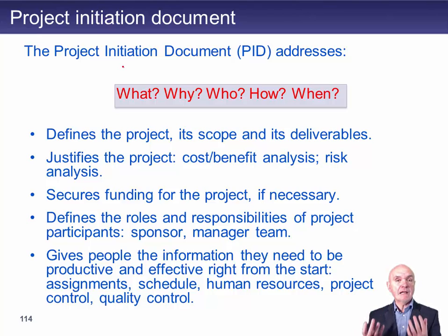So all these big kind of questions, how much is it going to cost and so on, are going to be pinned down in this project initiation document and should be pinned down as far as possible before the project starts. Because again, if you begin a project before pinning this down, then this is when project drift begins coming in, and projects really begin going astray. So here are all the things which are to be found in this project initiation document.